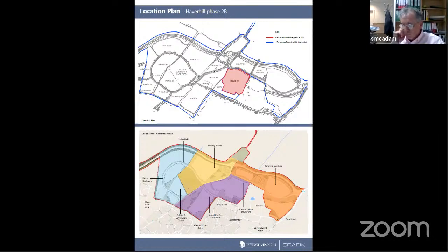So the next phase is planned from the 8th of March to the 30th of March, and that's to install the arms of the roundabout in the eastern end there into the northeastbound lane. So there'll be a traffic light system. So that will be something that's happening very soon. I'm pleased to say that, and I'm sure you'll all be pleased to hear, that we're progressing swiftly with that.